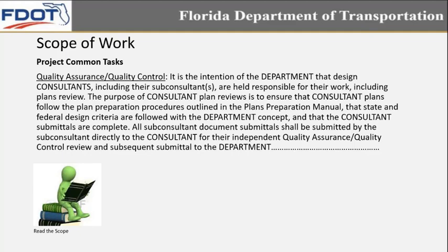And all sub-consultant document submittals shall be submitted by the sub-consultant directly to the consultant for their independent quality assurance, quality control review, and subsequent submittal to the department. What all this is saying is that when consultants are awarded projects with the department, part of their scope of work is quality control. That's the default part of any contract.